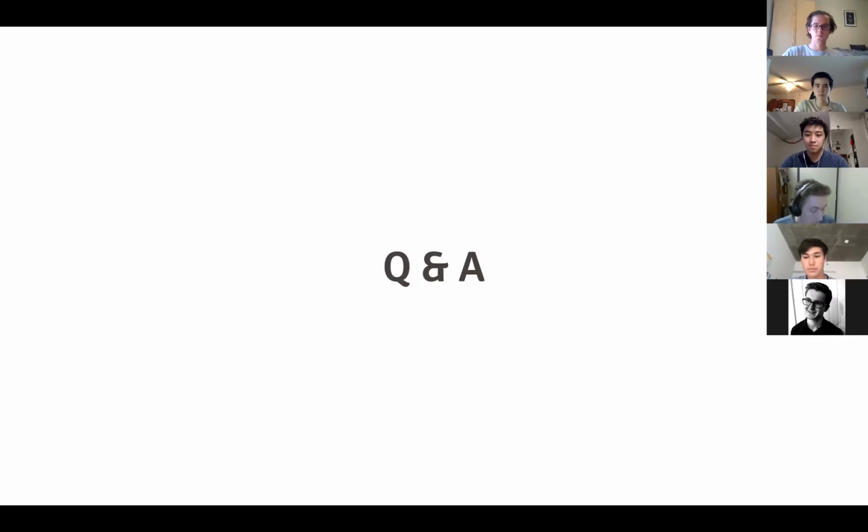The second one, as we've seen before and as others talked about in the slides, is knowing the respective skill levels of each of your developers and then pairing them accordingly, such that you match developers that are adjacent, so to speak, in their skill level. So if you have one developer that's really the best developer and then you have the worst, perhaps you don't pair them together that often, because doing so would mean that one does everything and one does nothing. Now, sometimes you're given a project team where that's difficult because you have a lot of really good developers and a lot of not so great developers, and that becomes more difficult. But those are two quick hitter strategies. Again, I imagine other people have other thoughts as well.